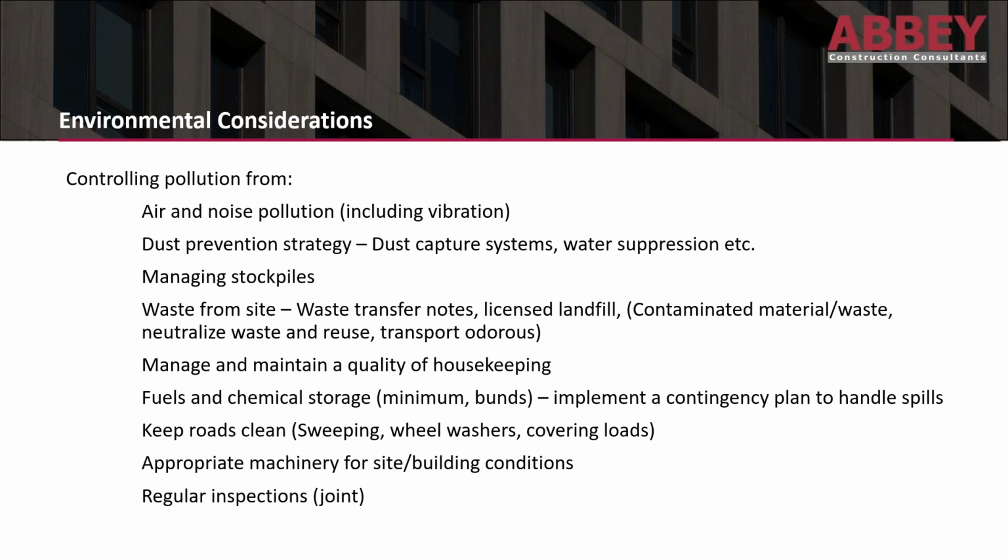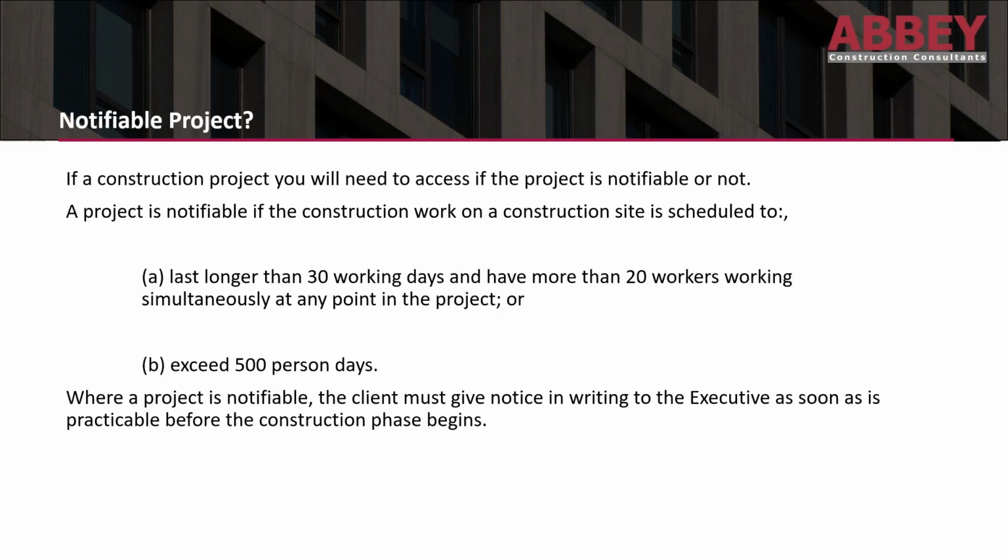So you would, as part of your rules, include this information. This is what we expect whilst you're doing this work for us. And then you would either do a client-specific or a joint inspection with the contractor to make sure what you wanted was indeed being provided on site.